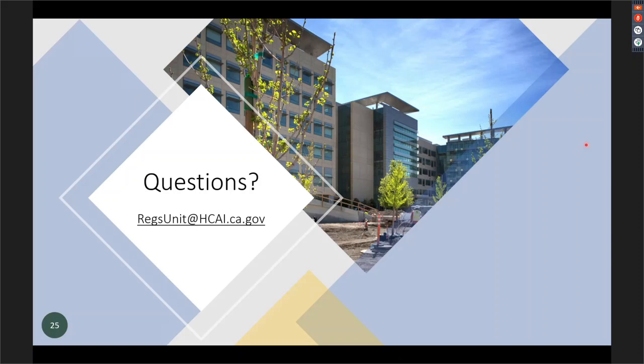I want to use this detail at this location. It's pre-approved. We had a question yesterday saying, we have wall framing details. Well, if they add a new wall, it's NMA. No, the location of the wall is not part of the detail. The detail is the construction of the wall. So if you move a wall or add a wall, you now have a material change, or could have a material change. But the pre-approved detail is just how that wall is constructed. Now you don't need an ACD to add that OPD.